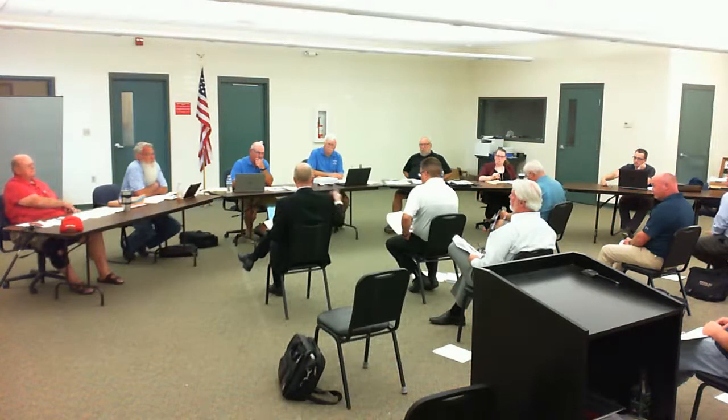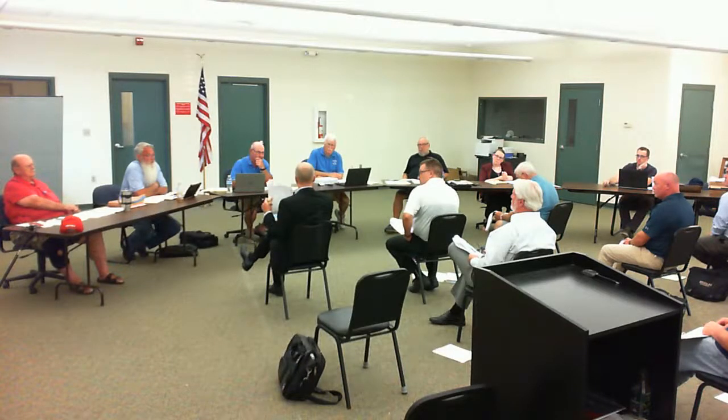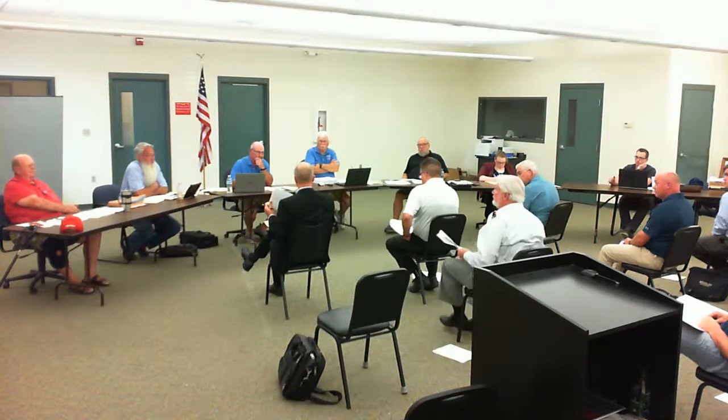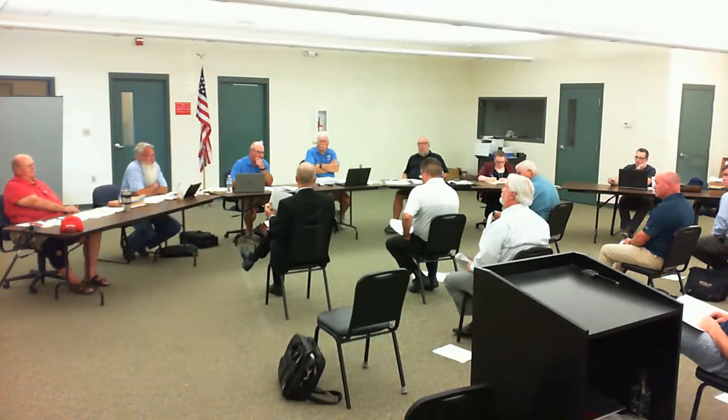I mentioned earlier, well, back up for a second. This contemplates a 3-year phase-in. So if you said go, and the city council said go, you're not going to have $1.x million a year in capital to be going out and spending the first year. The first couple of years, I would imagine you're going to be spending the project money from the bonds, and that'll take a couple of years to do all the projects. After that, you'll have the 25% rate increase, and starting whatever day, whatever month the first billing goes out, you'll be accumulating one-twelfth of whatever the increase is. And at the end of the third year, you will then be bringing in that $1.x million a year in capital. So that's really going to be your fluctuating budget.